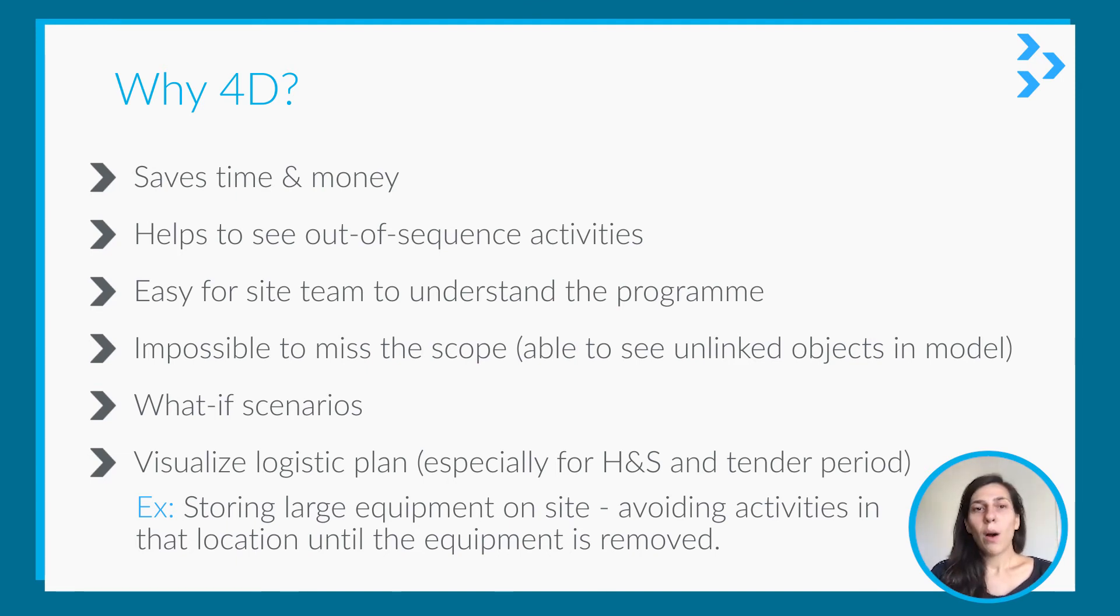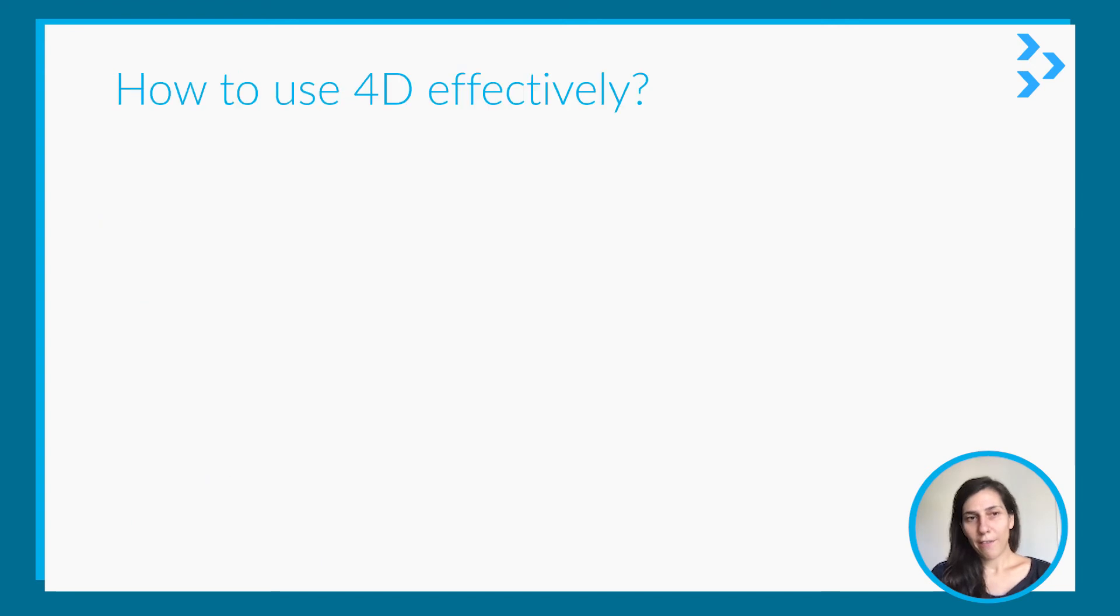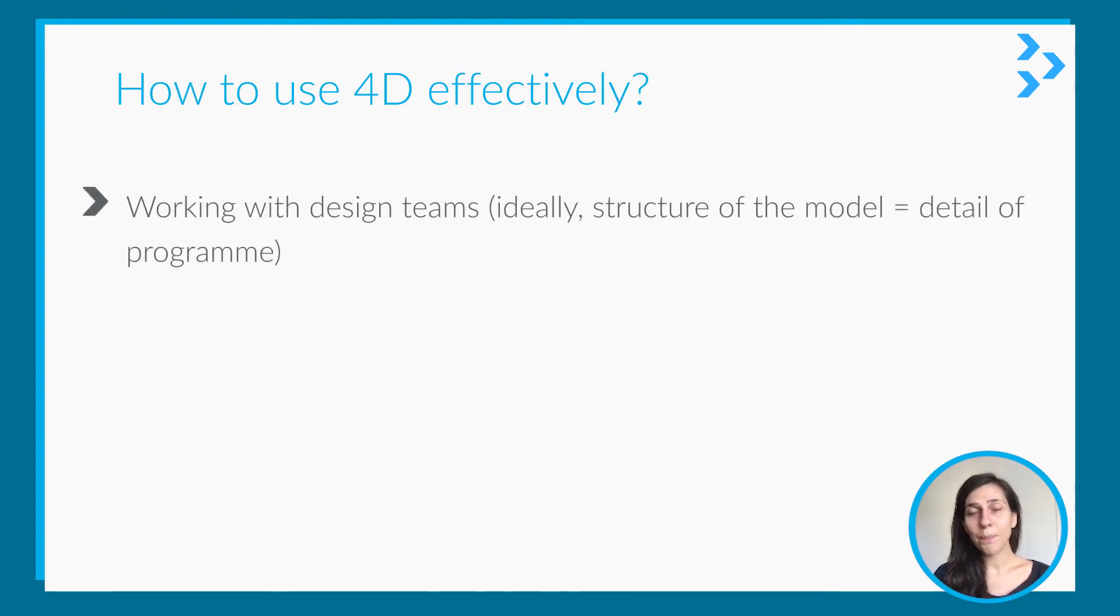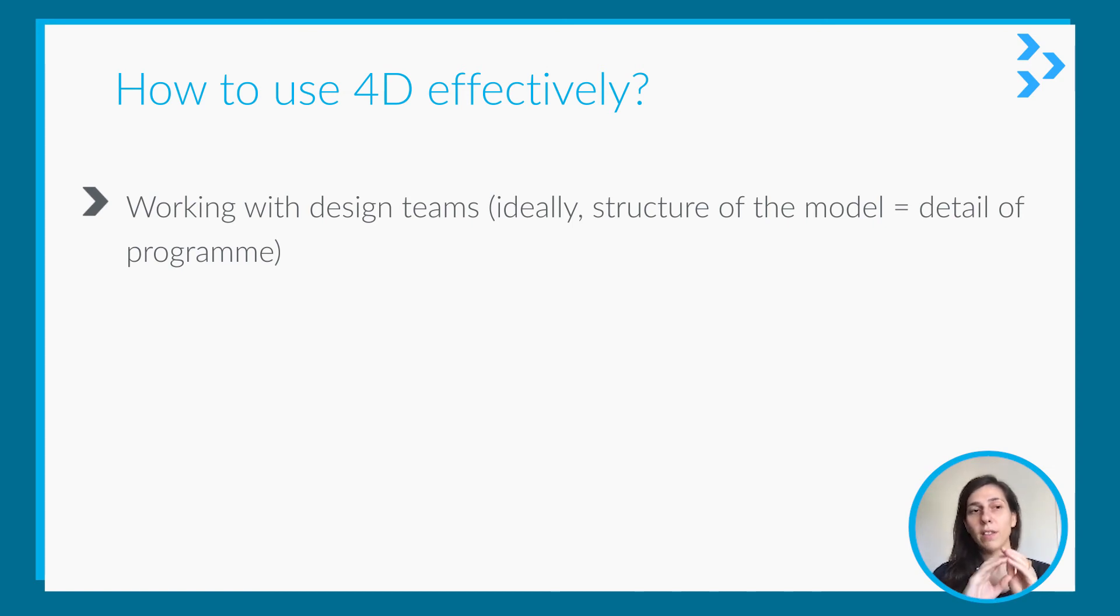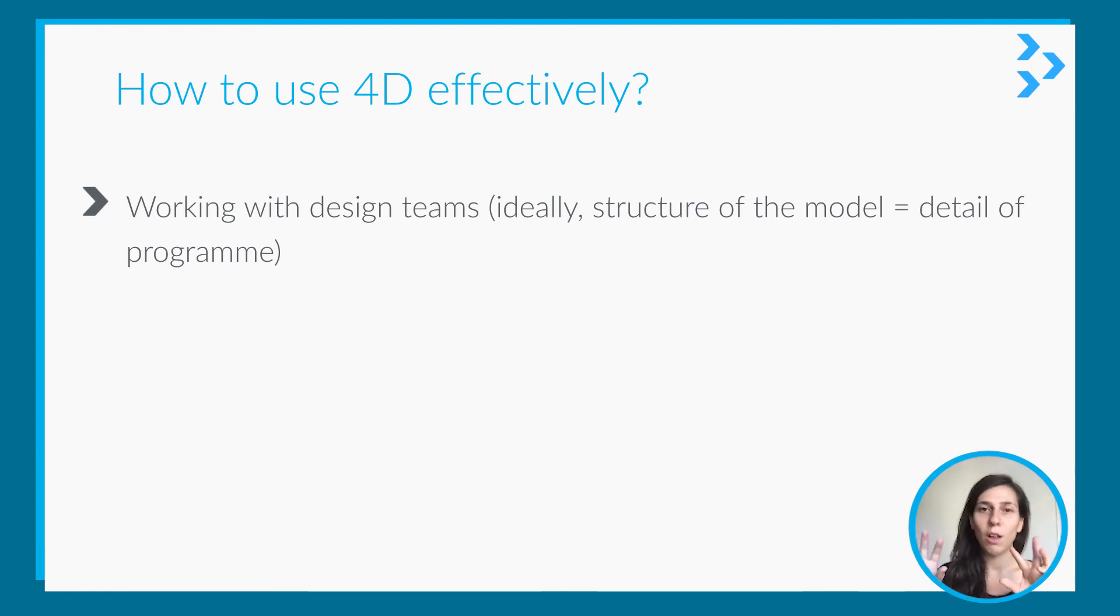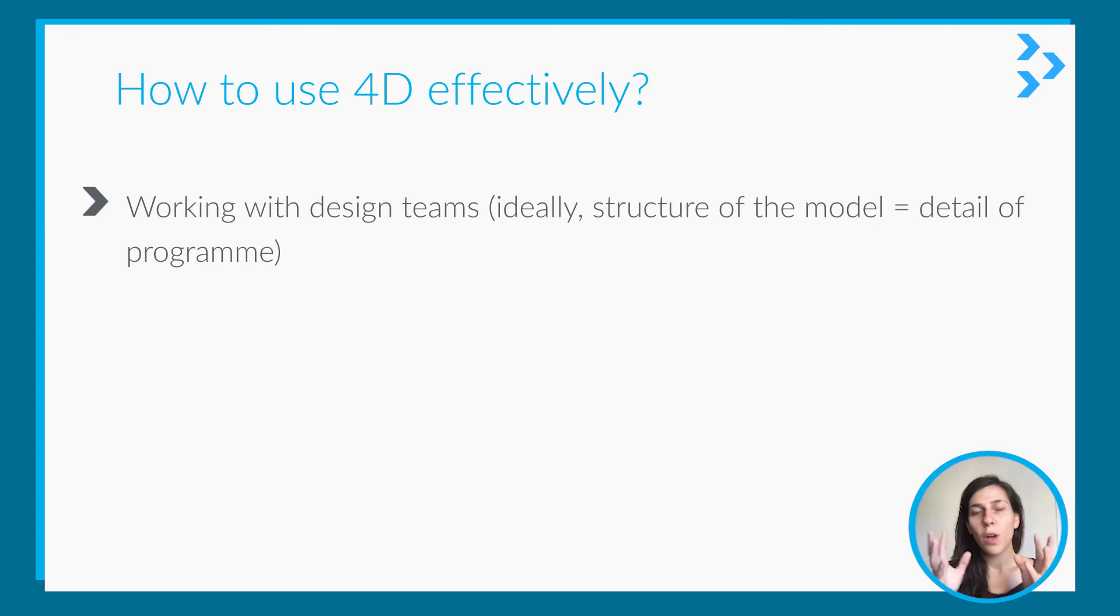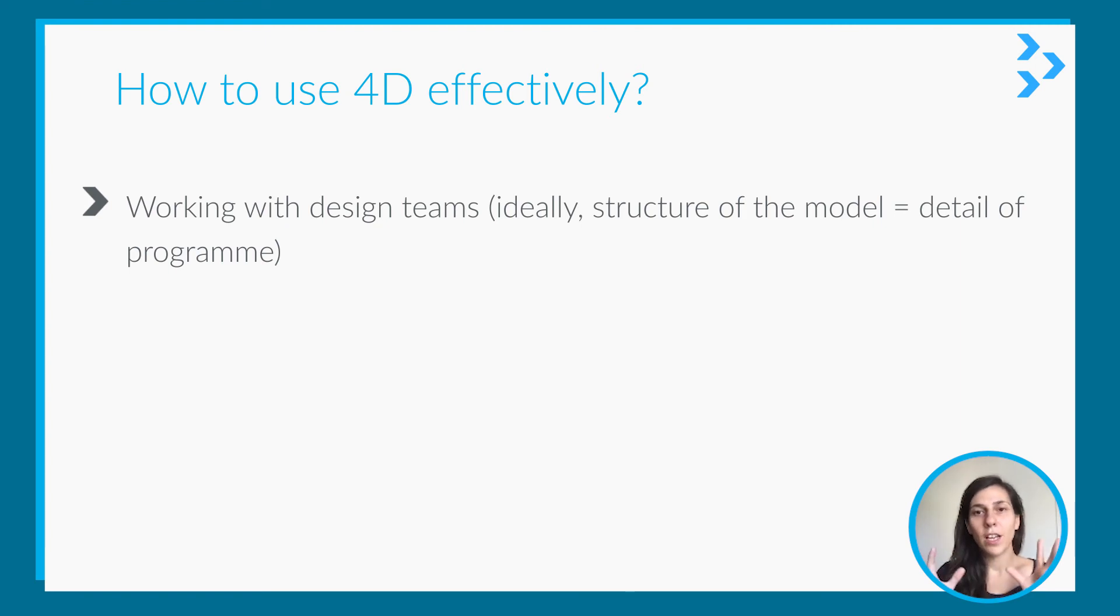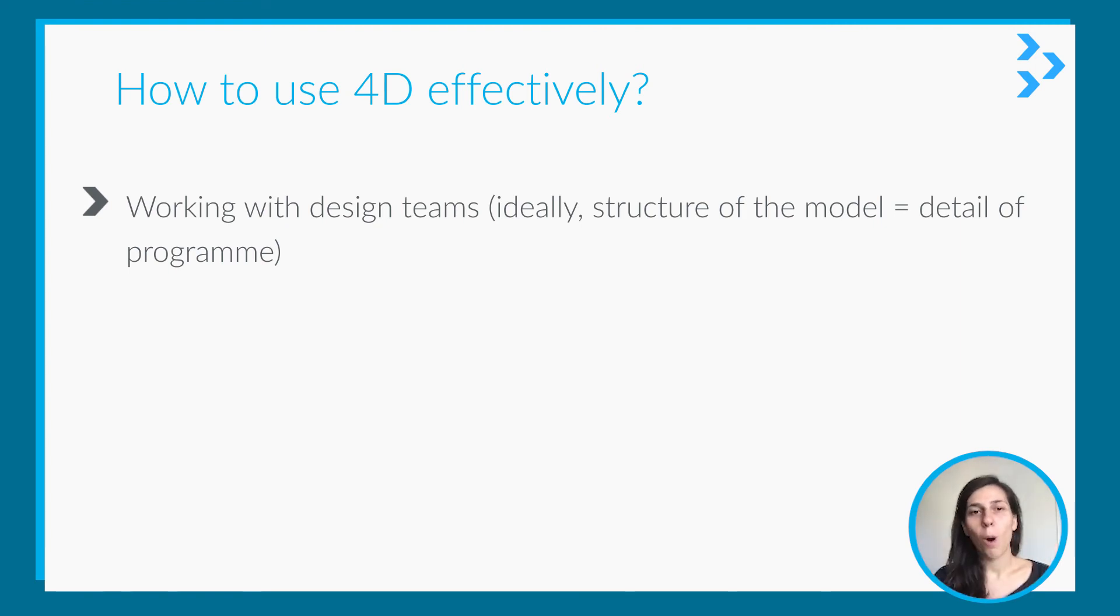So how can we use it effectively? First of all, you need to work with the design team. This is really important. Ideally, the structure of the model should be equal to the detail of the program. So whatever you have in the model, you need to have an activity in the program so you can match them and be sure that you have all the scope in your program.